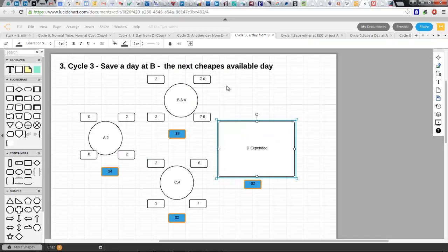One of the things to note, coming back to the drawing, at the same cycle we're on, you'll notice the finish date of B now aligns with the finish date of C. The early finish time of C at 6 is aligning with the finish time of B. That means we have to move both of these. We have to buy a day, if they're available, from B and from C. We have to move these together to move this back. So when we save a day, we're now only taking 5 days through this point of the network.